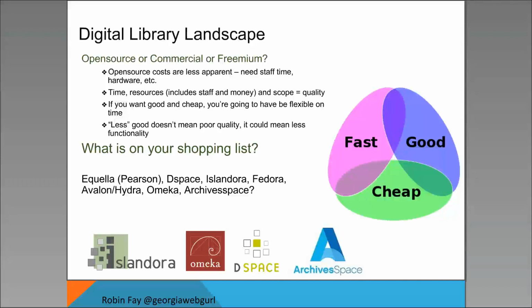But you may find that there are things in the software that you're looking for that may cost extra money. So even if something is open source, that doesn't mean that there's no cost associated with it. There's the hidden cost of staff time, hardware, and certainly any software that you would need to support those open source products. If you need more server space, if you need any server space, if you need a domain, any of that is going to cost you. People are becoming more aware that open source is not completely free.